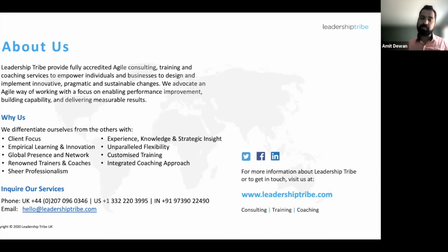It's a more fundamental systemic problem, where we're not looking at the big picture and seeing, is this a problem of the team not delivering, or is this maybe a planning problem? If there is a dependency, and I don't know if you've heard of the term INVEST, which is independent, negotiable, valuable, estimatable. That first term, independent, I think every story needs to be independent. And if there is a dependency on a story, I would challenge why start working on that story. So I think that's number one.